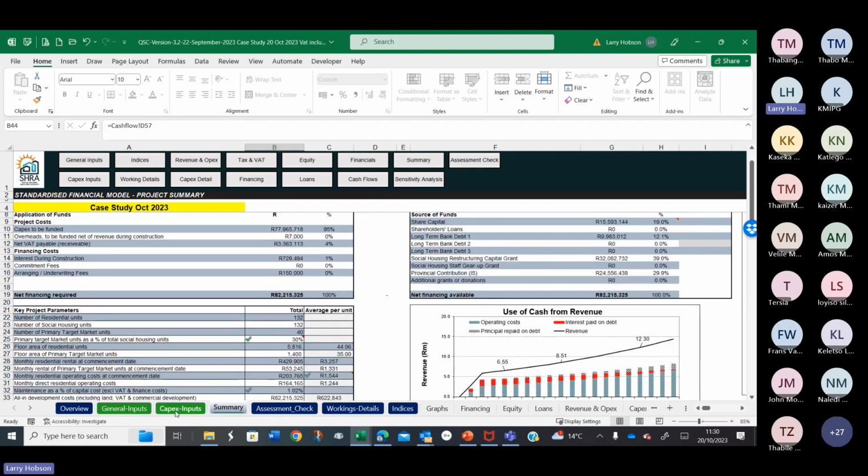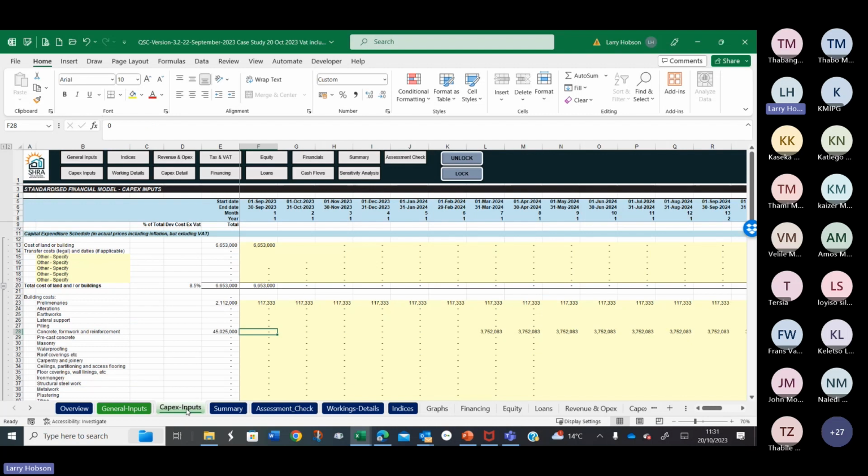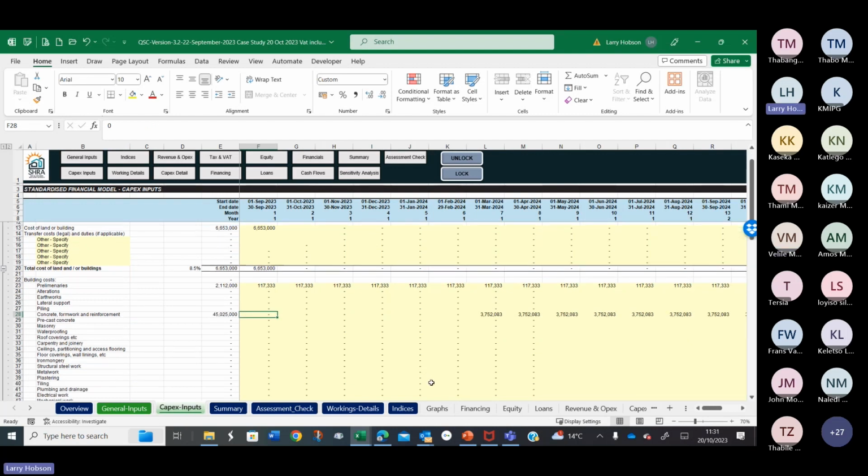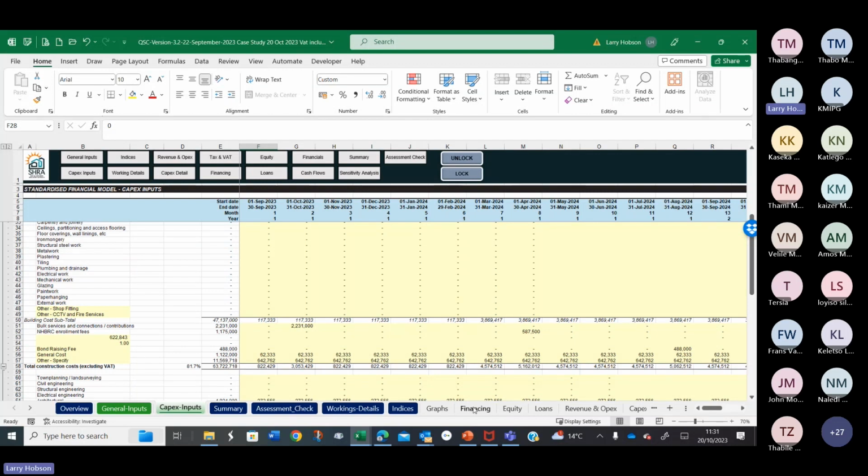So we've gone through our layering process. We've reduced what's within our power to reduce, which is operating costs. Let's go to the last resort, our development costs. What I've got here is a factor that's running through the model, this one here. So we're going to reduce that factor and call it 0.9.